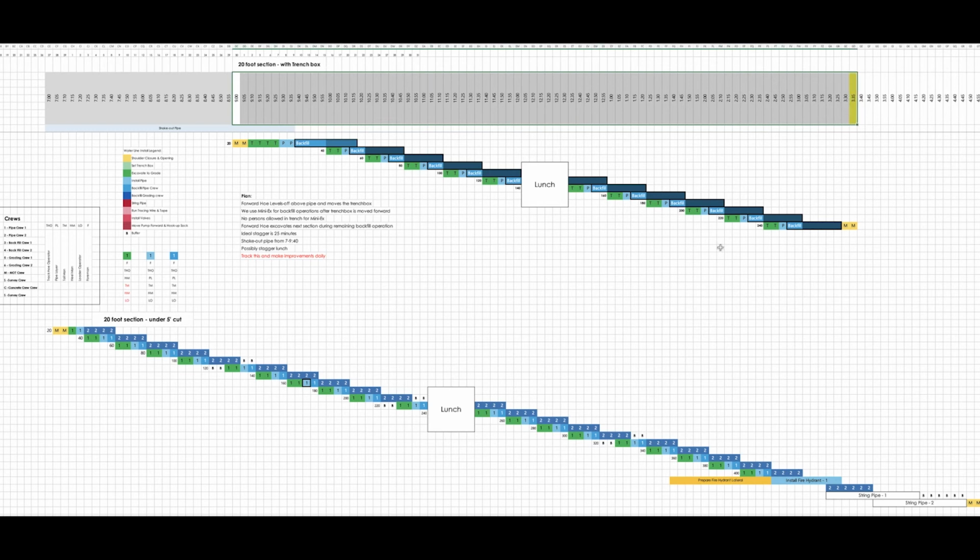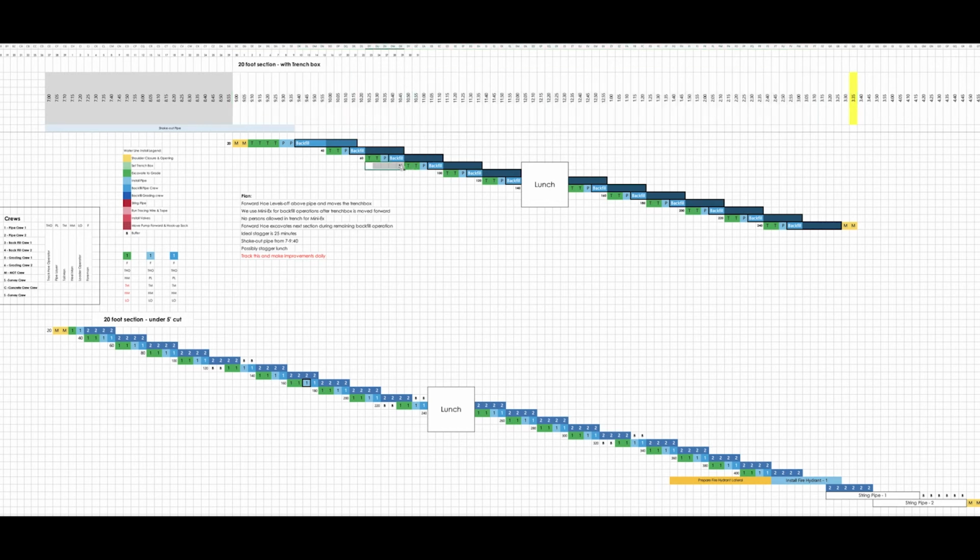So they were able to fill out this takt plan, and the takt time is every 5 minutes, and the stagger is every 25 minutes. And this plan allows everybody on the crew, meaning the track hoe operator, the pipe layer, the tail man, the heel man, the loader operator, and the foreman, to know where they should be at any given point, meaning 20 foot, 40 foot, 60 foot, 80 foot, at any given time throughout the day. And as long as they're working safely in a stable manner, they can track production real time as they go to plan their work, do it right, and finish as they go, right?